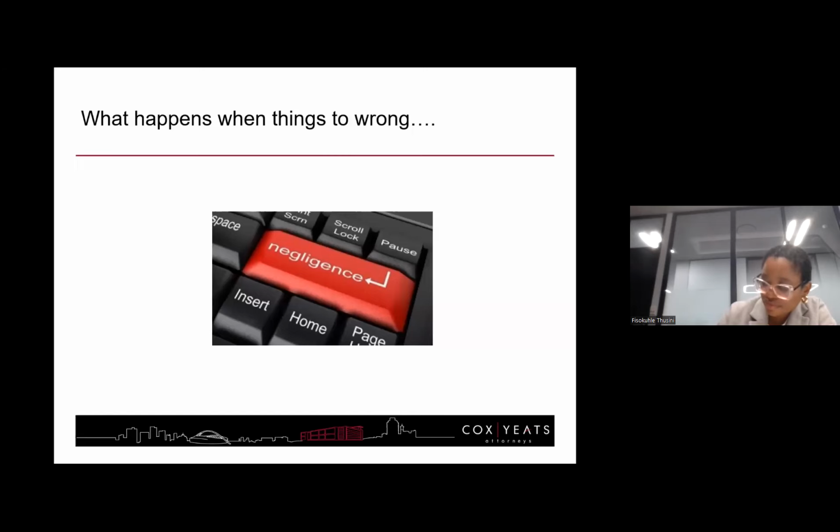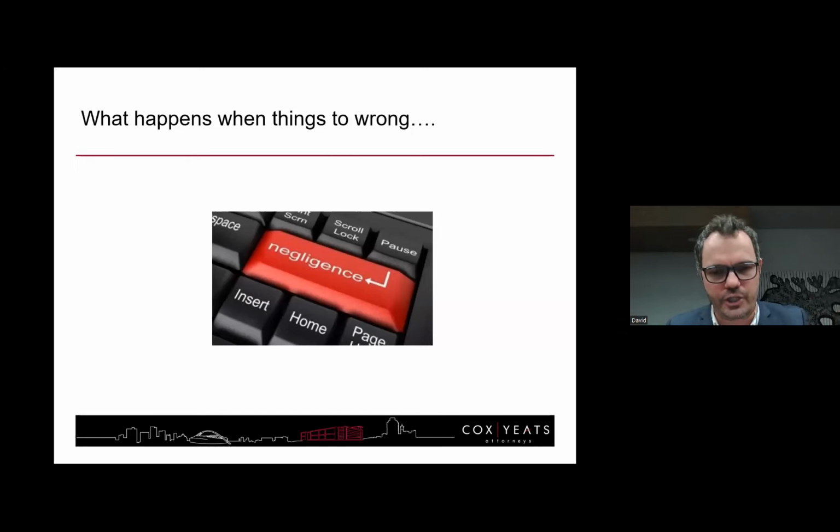Number 2, your liability is governed by the terms of that contract. So what does your contract say? So if you have nothing in writing, well, what did the parties agree? Tacitly, in email? Is it partially written, partially oral? Is it a contract by conduct? So you've got to start there if it's not written. Strip out emails, strip out correspondence. What exists that can help me establish what the contract is?